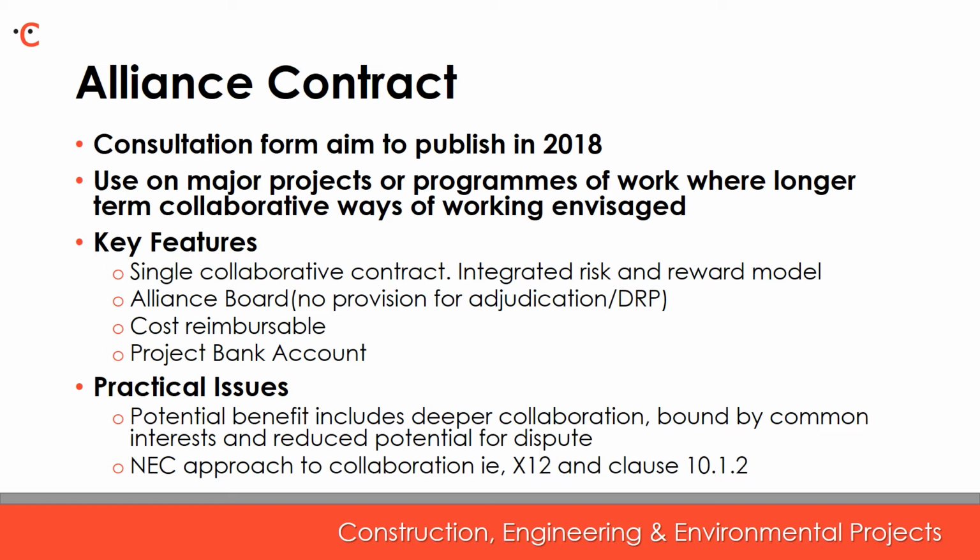The ethos behind the contract being to incentivise and reward project participants by reference to success or failure of the project as a whole, rather than focusing on individual performance. So in essence, therefore, it's a new form of partnering contract and has been produced in response to client demand with the aims of supporting clients' intentions to fully integrate a multi-party delivery team for large, complex projects.